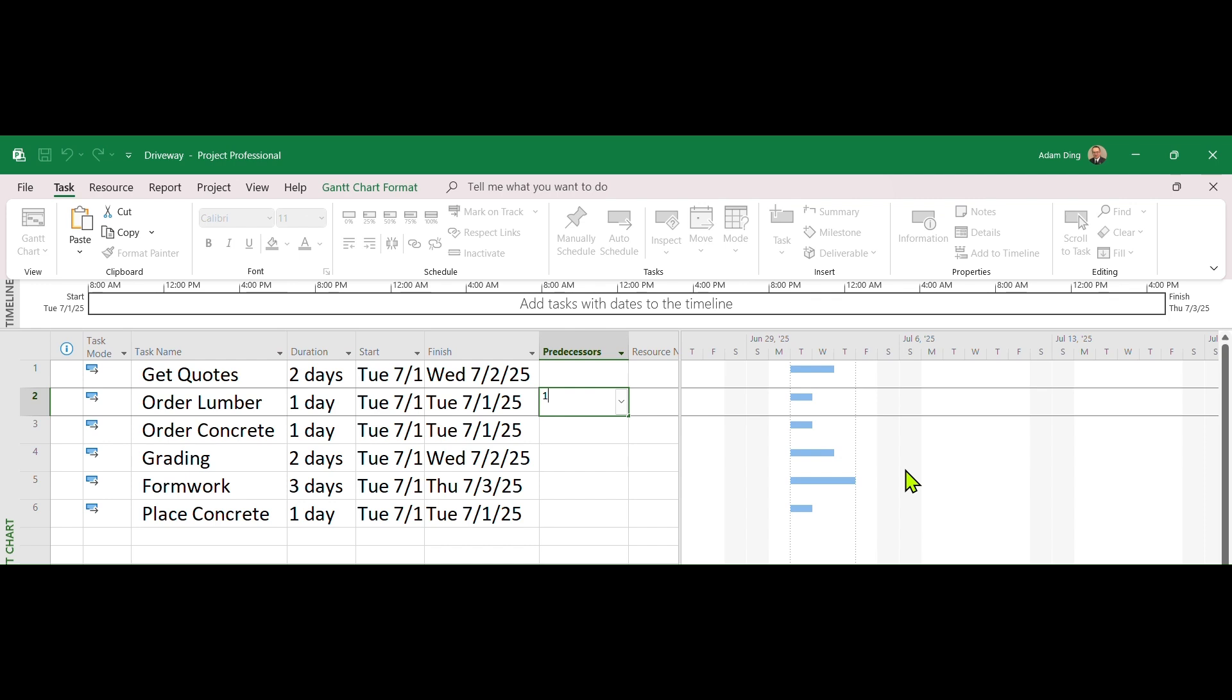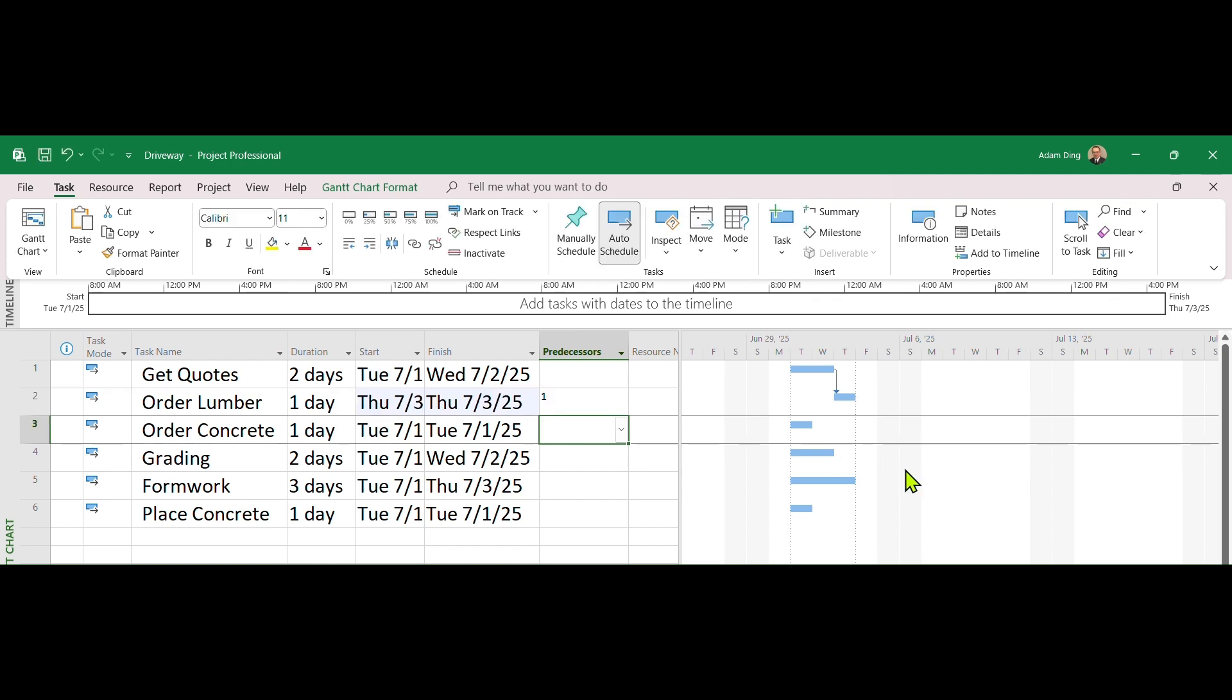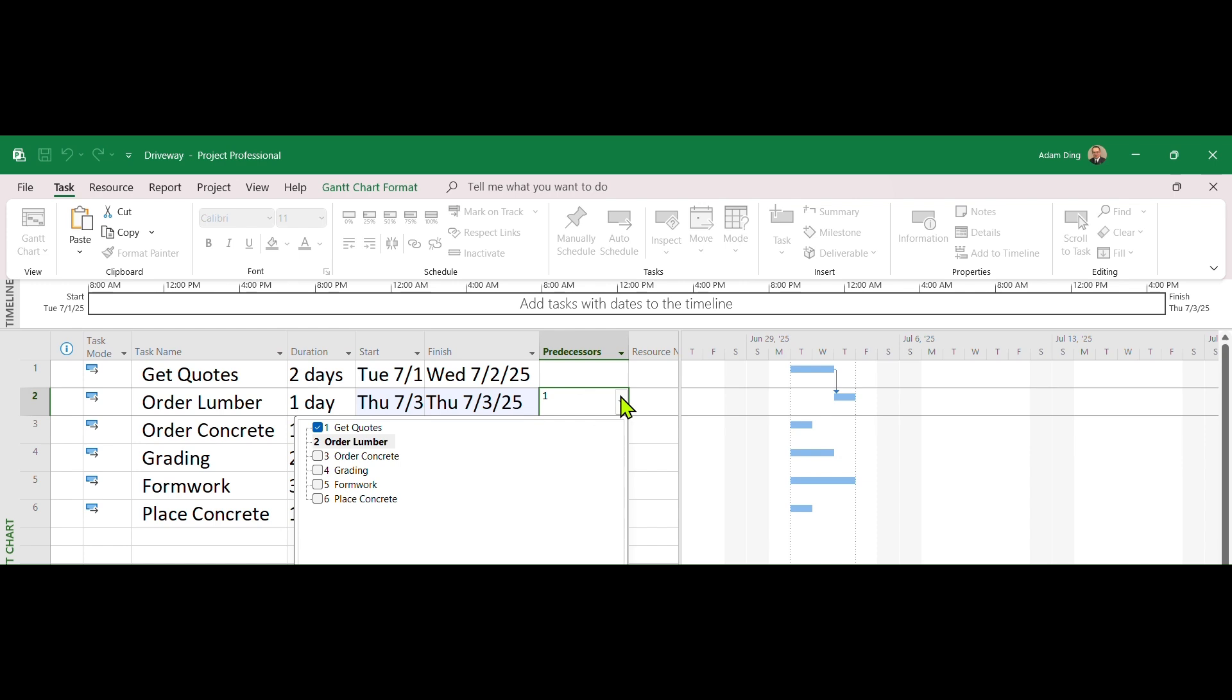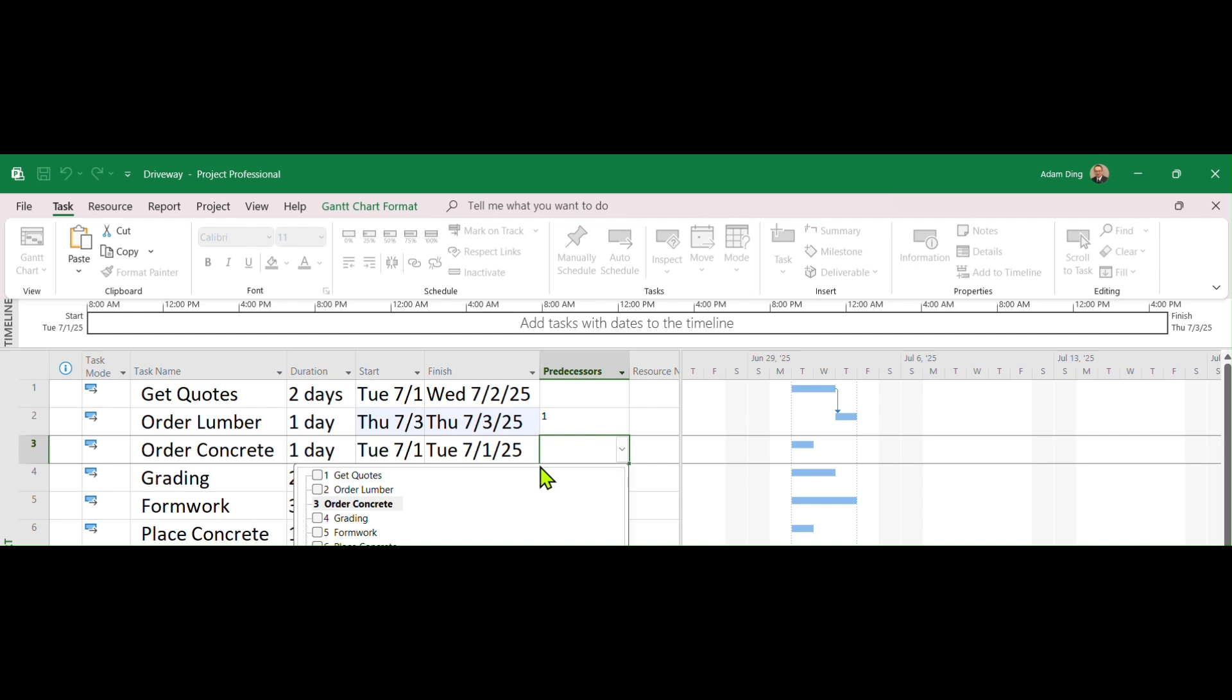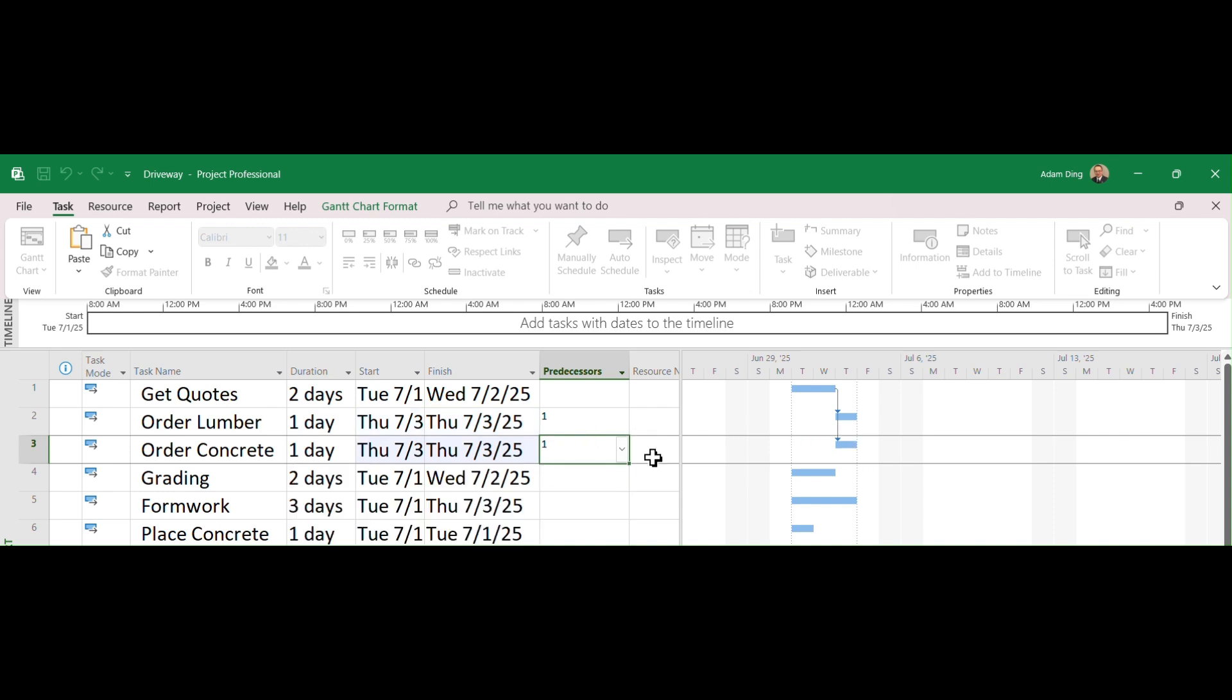This means Get Quotes before Order Lumber. That is, 1 is the predecessor of 2. Move to the next task, Order Concrete. You can just use the drop-down box to pick the same predecessor.